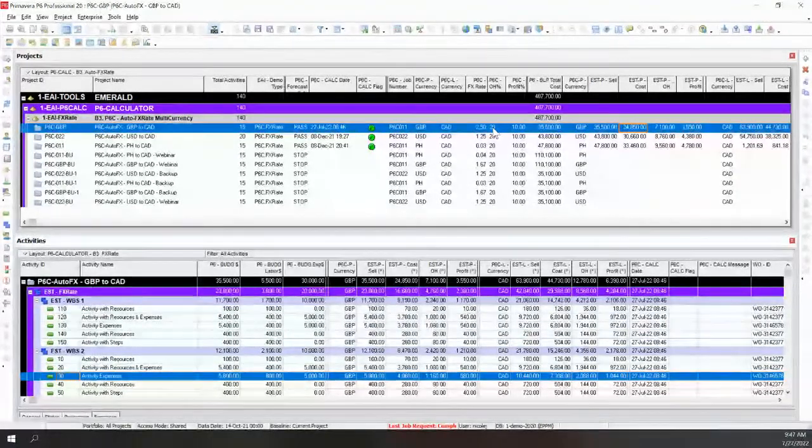You can have an override on certain activities where you might want to get 100% profit, and on another activity you might prefer to just put it at 5. Maybe it's a change order and you're negotiating and you want to show some good faith. So you can do many different things. Again, I'm just going with the more simplistic example. So we see the overhead total and the profit total. Now these are being rolled up from the lower level items.